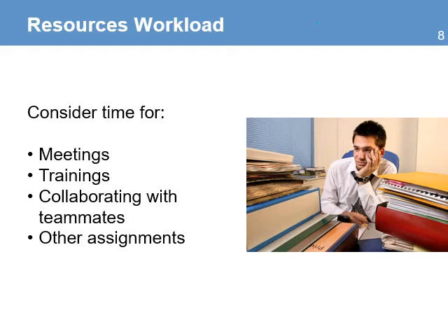6 hours per day equals 30 hours per week, or about 120 hours per month that are available for a team member to work on project-specific activities.